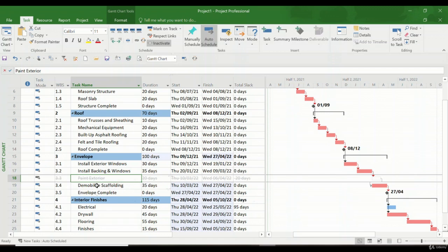The important thing is that the successor task that was here is taking the place of this task, and right now, as you see, it is moved a little because this task seems not to exist anymore. But make sure, if this is something you want, you can just change the predecessor to row 17, which is the install task and others, if it doesn't violate the logic of your project.